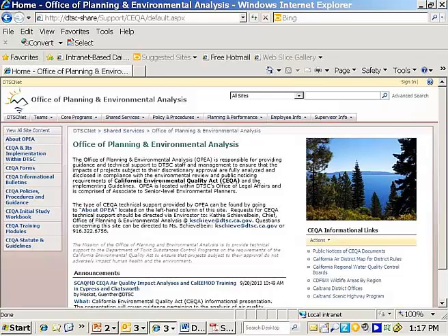The costs are anticipated in the permit application process. In terms of how much time a permit project manager might feel it takes to do the technical portion of it, it's an estimate of CEQA hours. As you know, that's built into the upfront cost of the permit. And then in the cleanup program, it's cost reimbursable. Whatever charges are incurred on the cleanup portion, as well as CEQA sites, are counted in the data logging, and that's paid for by the RP.